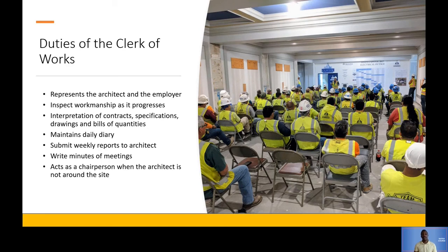He maintains a daily diary. Now, he is always on site. He has to be on site to monitor everything. So as he inspects, he writes down in a diary, and that diary is called the daily diary because he writes down every day. He records what was happening on site, where, when, and how. He must be as detailed as possible.